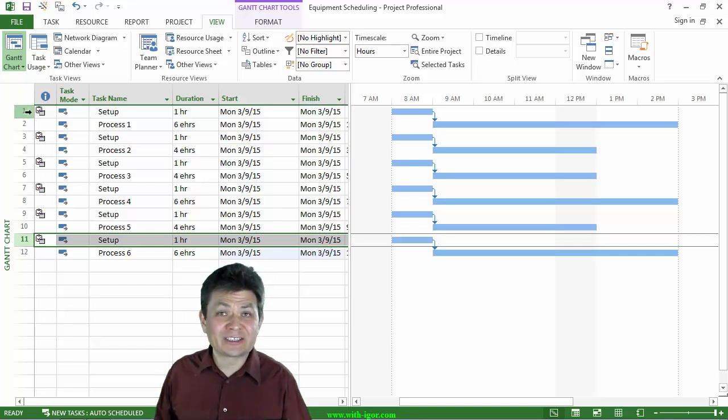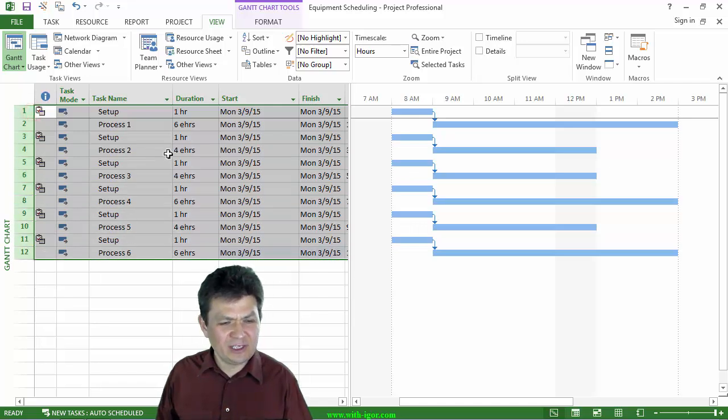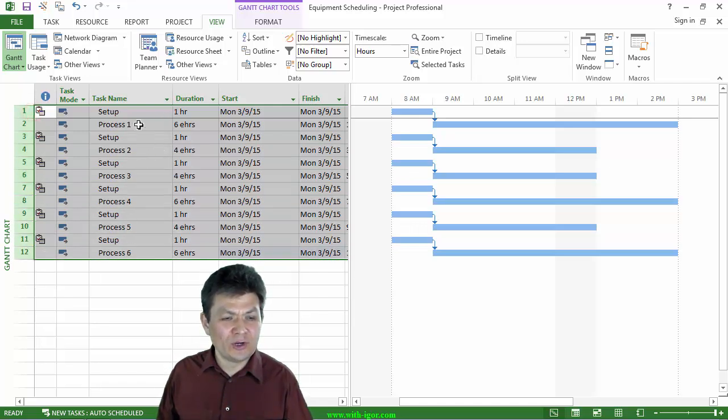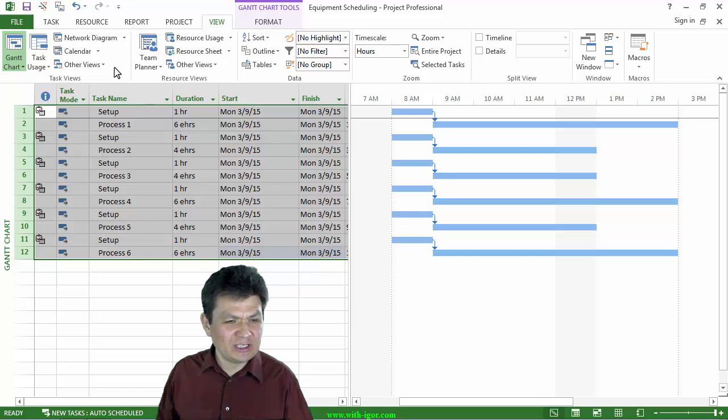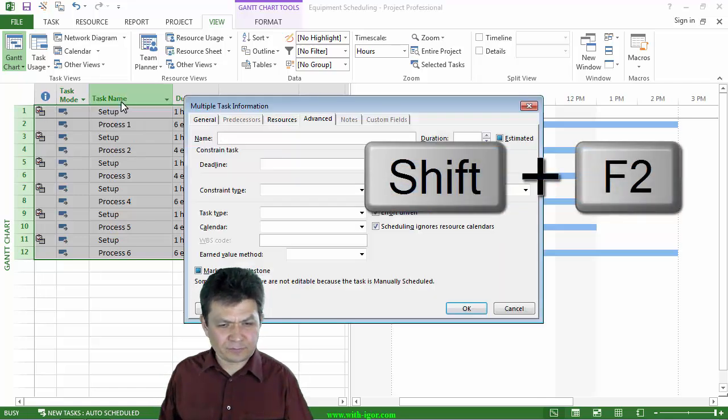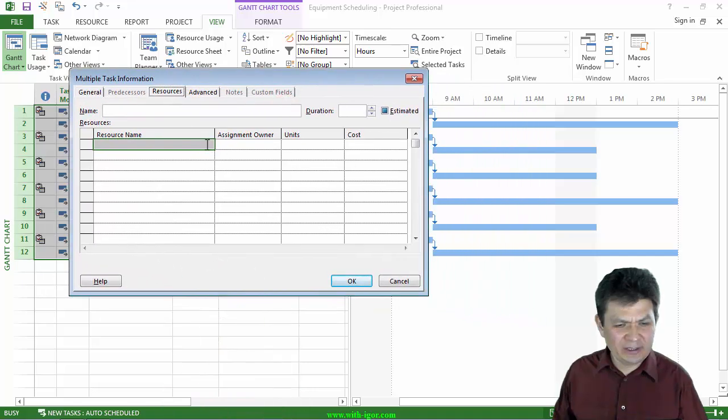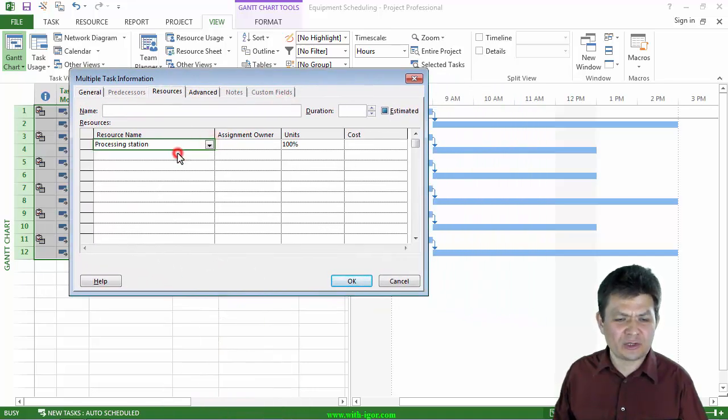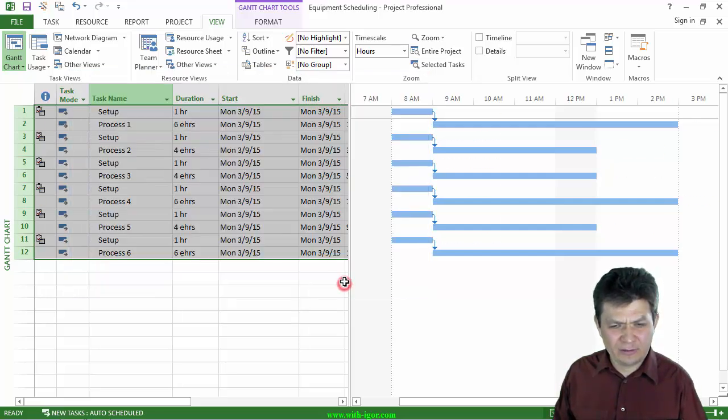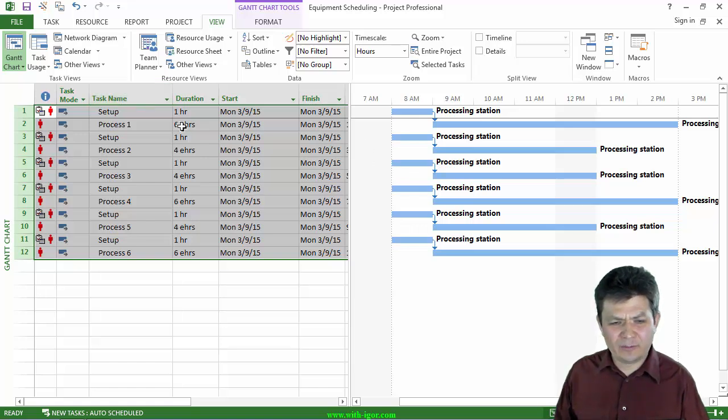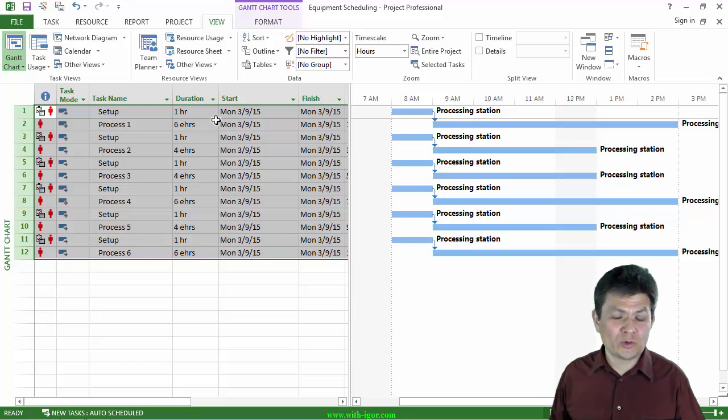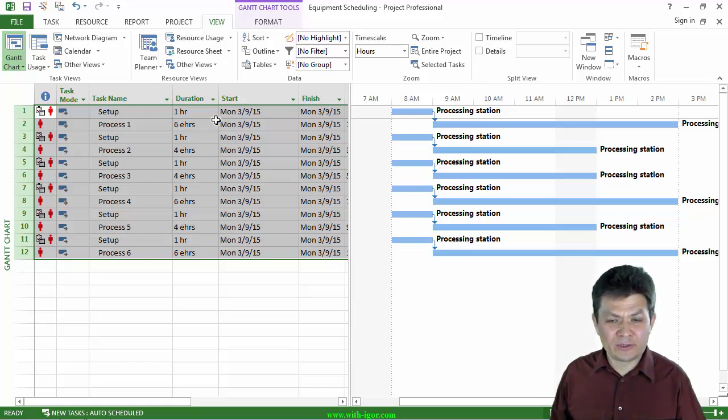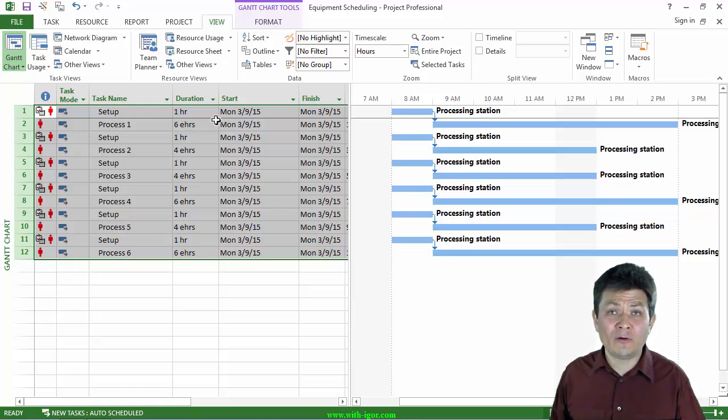Now, I did that so that when I level my activities here or tasks, I want each one of them to run as long as necessary. But each one of them needs to start only during the regular business hours. Well, now it's time to assign our resource. I'm going to select all of these, including setup and process 1, setup and process 2, all of the setup tasks and their consecutive linked processes. And I'm going to do Shift-F2. Click on resources and assign my processing station to all of these tasks. I'm going to click OK.